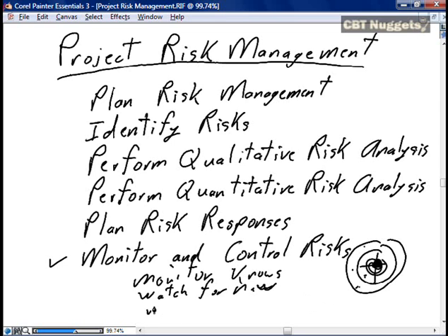And most importantly, we're going to manage the contingency for a project, making sure that any contingency reserved for a known risk is used only for that known risk, and allowing for the acceptance of the usage of the contingency as risk events occur, and preserving the risk contingency for the unknown, unscheduled risks, and allocating them to the new risks as appropriate. With effective risk management in place for our project, we're well on the way for effective project delivery.